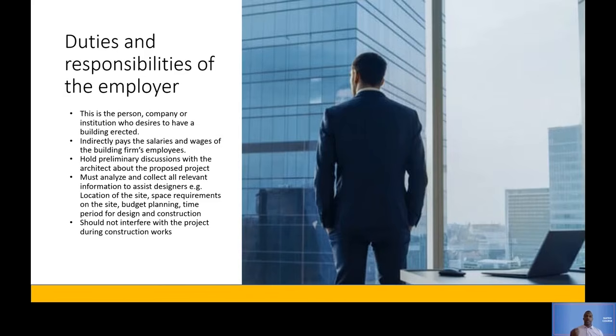For example, if the architect had designed a window to be on the right of a certain wall, the employer cannot go to site and say, no, remove that window from the right, I want it on the left. He cannot do that. Once the design has been approved by himself, he cannot go back on his word and make changes when construction is happening.